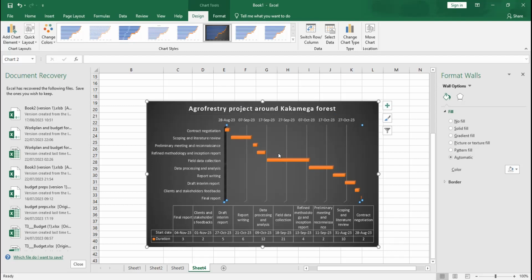So when we talk about contract negotiation, we can now assign the number of days the contract negotiation will take us, and perhaps the resource, the person who is going to do the contract negotiation for us. Anytime that we decompose a project to an extent where we can easily assign responsibility and the task, we simply call it an activity. An activity is what we transfer to our Gantt chart when we are doing planning.